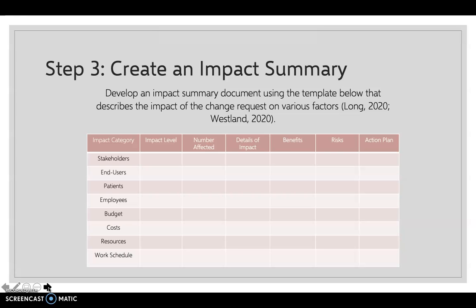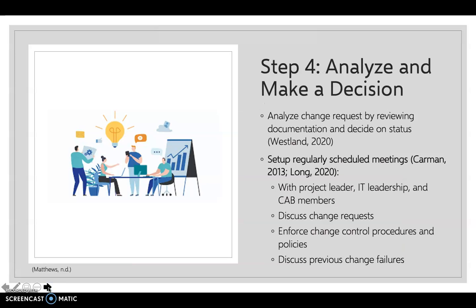and end user utilization. In the fourth step, change requests should be analyzed to determine if they disrupt or overlap with any of the current project tasks. After reviewing the change request form and the evaluation matrix, the CAB members and the leader should meet to decide on assigning an approval, deferral, or rejection status to the proposed change. It's easier if draft templates for approval, deferral, and rejection are created prior to making this decision so that they can quickly be filled out after a decision is made.